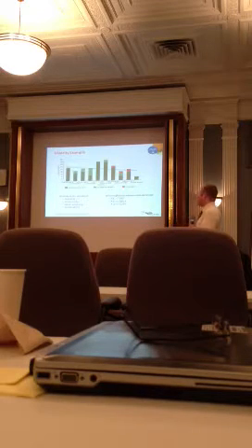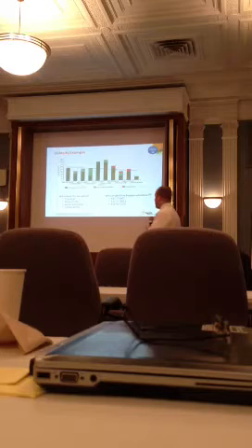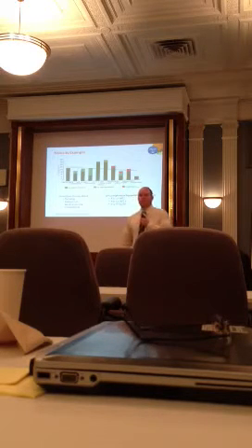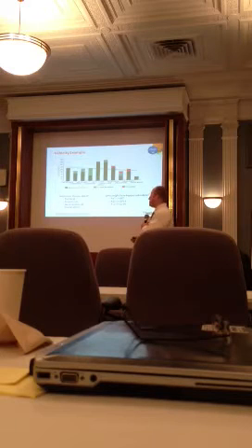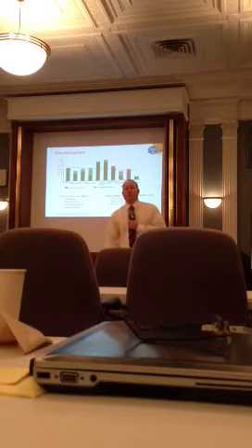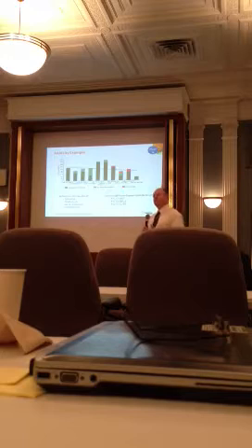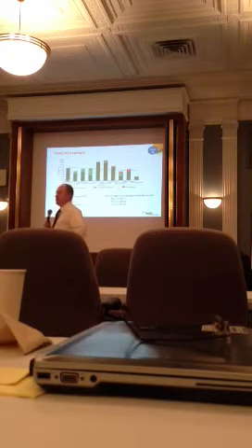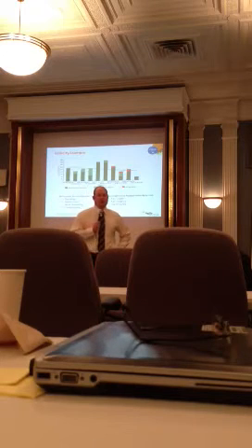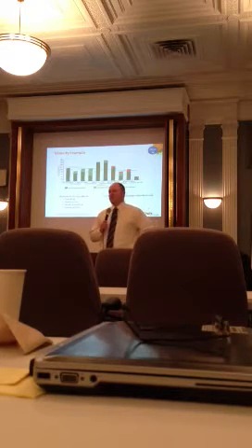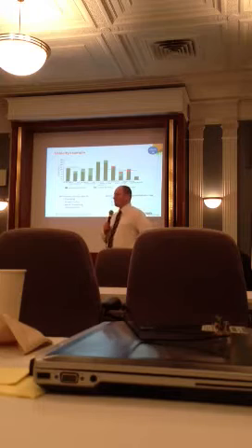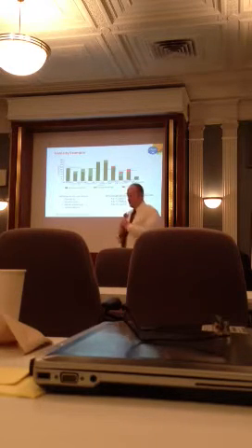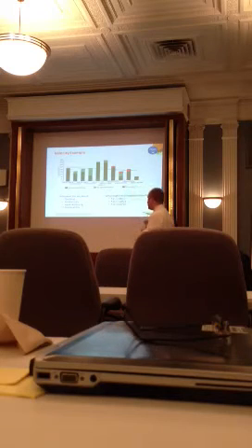Now I'm going to jump back here to the beginning. In this August iteration, I committed to 110 story points, and it looks like we got acceptance on about 105. So it's not ideal, it's not perfect, but it's not the end of the world that I committed to 110 story points and we delivered over 95% and we got acceptance on over 95%. Right? It's not perfect, but I'm not going to lose sleep over it.